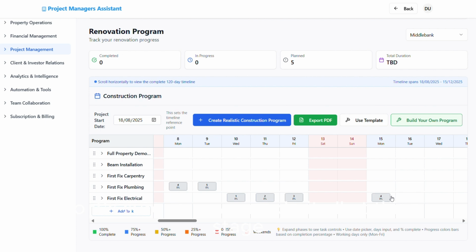So electrician will want to do it all at this stage because it's easier for them, but do not let them do it at this stage. All they do at this stage is the electrical first fix. That's getting all the cables in, that's all going to be buried, just coming out where you want all the sockets and like fittings and switches and everything. No socket fronts goes on at this stage.